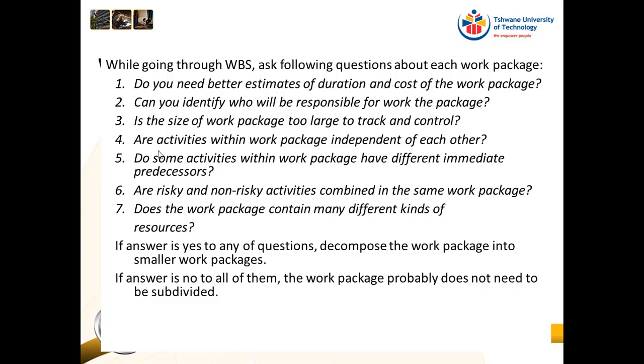So when you go through the WBS, you ask the following questions about each work package. Do you need better estimates of duration and cost for the work package? Can you identify who will be responsible for the work package? Is the size of the work package too large to track and control?